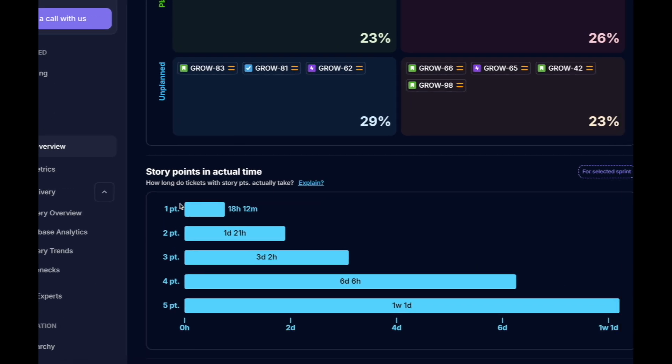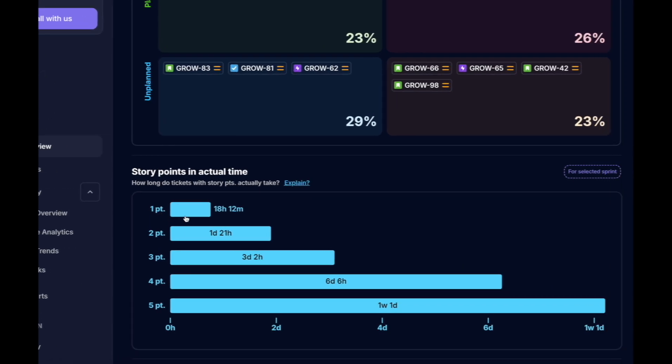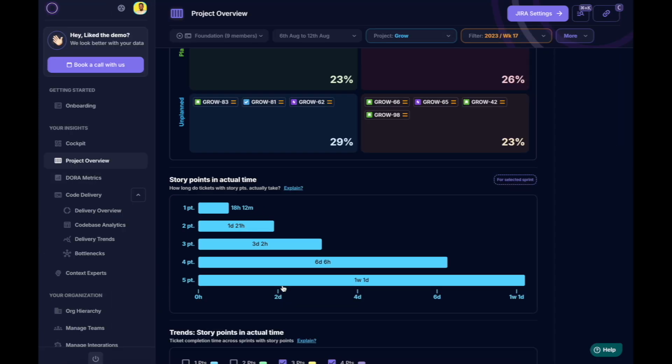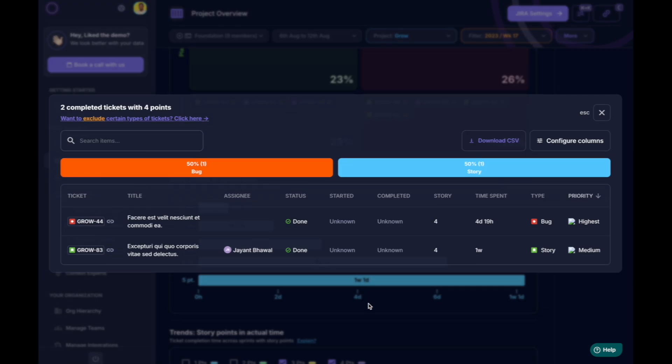Let's assume one point equals one day. The team seems to handle smaller tasks well but struggles with larger tasks, such as those estimated at four to five points.